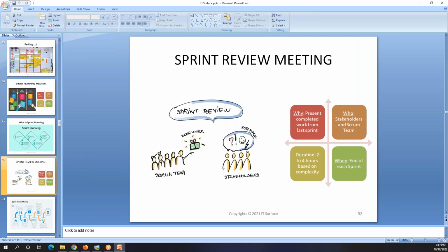And sprint review is about the things we did. The developer usually gives a demo of the product or the work they have done, and the product owner sees the demo, and if they like it, they accept it. If they don't, they say you have to work on that again, and they put it in the next sprint or next release.